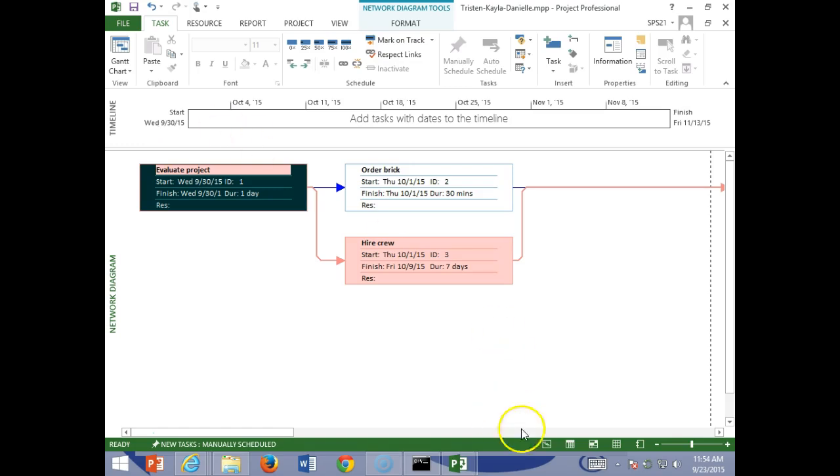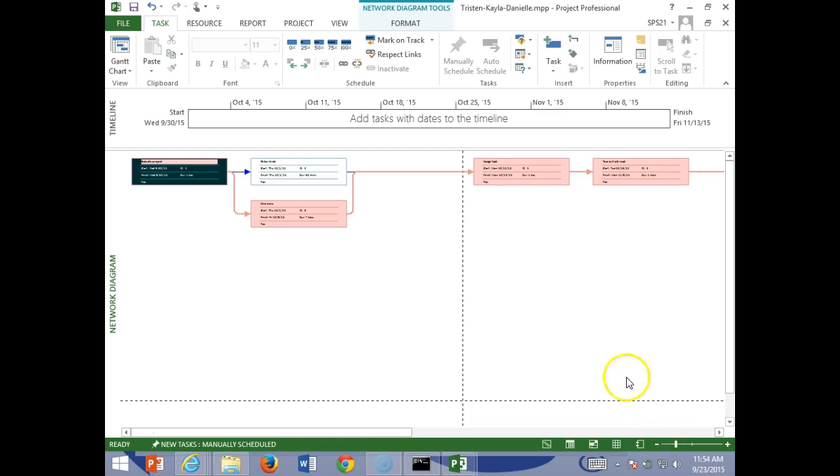Change my view a little bit here. So remember those network diagrams you had to construct in project management or operations management? We can actually construct one right here. And it does that activity on node. So in other words, each one of those is a node. And notice what it even does for us. It shows us that red line. It shows us that critical path.